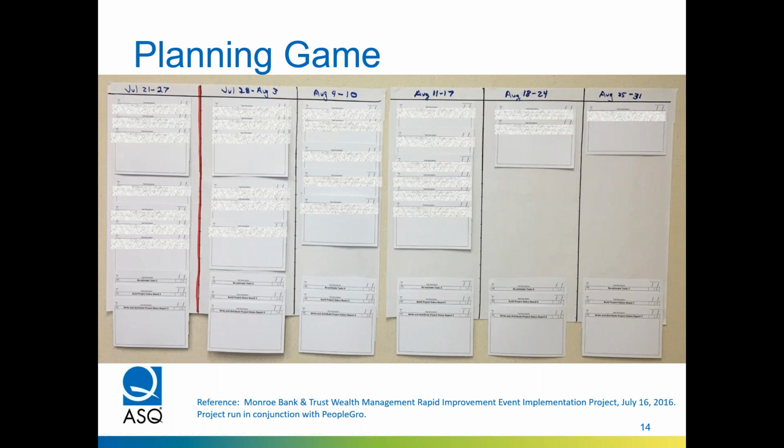So depending upon the task cards, these cards on the left here, you add up the times, it can't add up to more than, in our case, example 10, okay? In which case you may spill over into the next week and the next week and the next week. And that way you can show week by week what you expect to accomplish in this project.